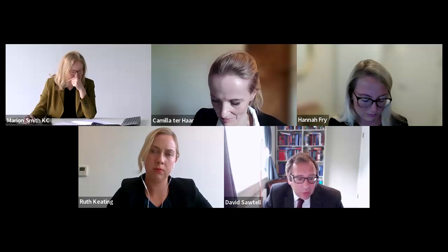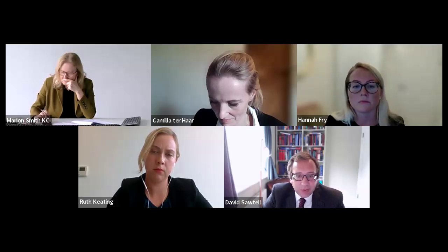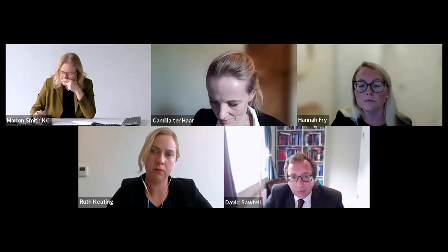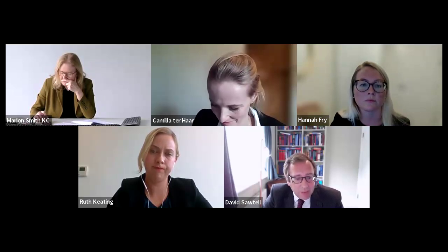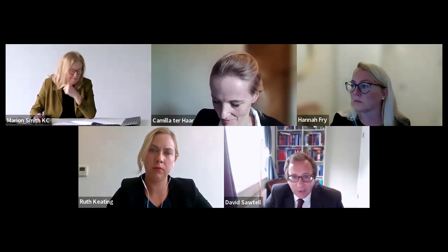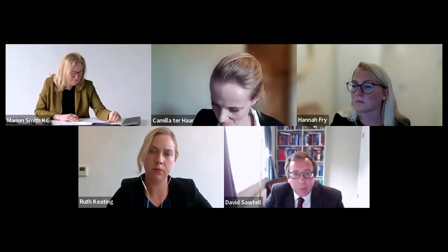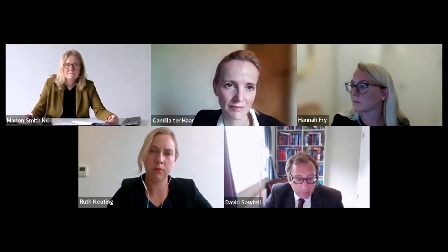Now, we've discussed the new relevant events, and I have to echo what's been said before. It's quite difficult to see how this is going to make a material difference to how we operate these contracts. So, epidemics, no real definition for epidemics, but they must affect availability or use of labour or persons providing services, or delaying contractors securing goods, materials, or services. So again, we're pushed back onto the contract administrator looking at causation.